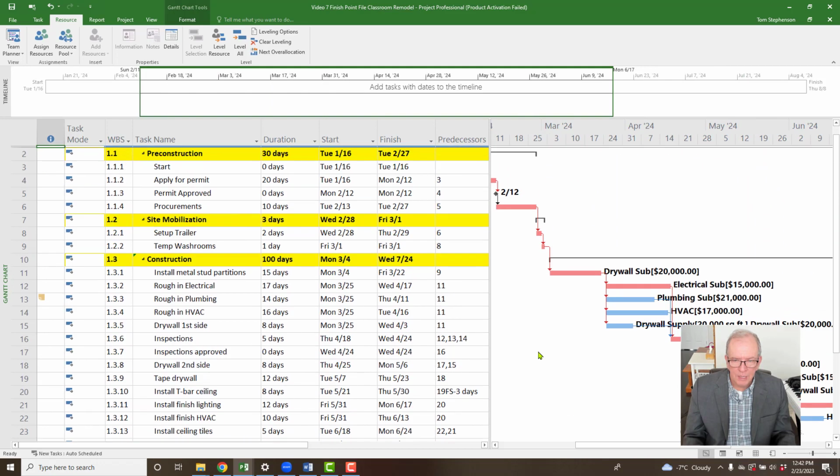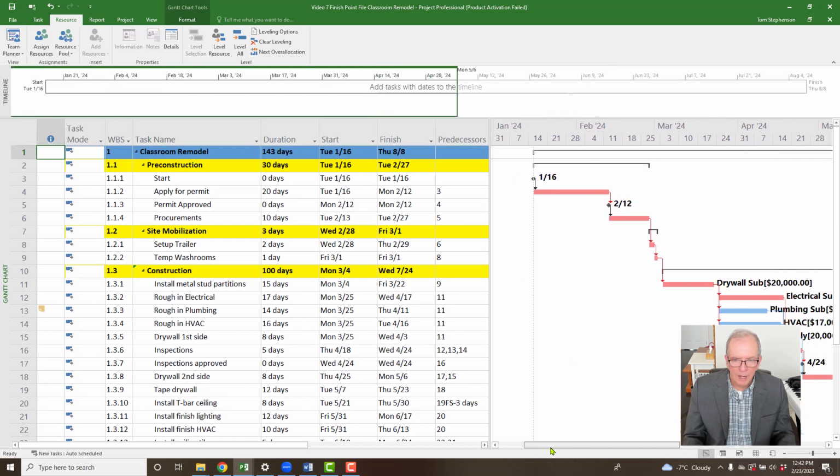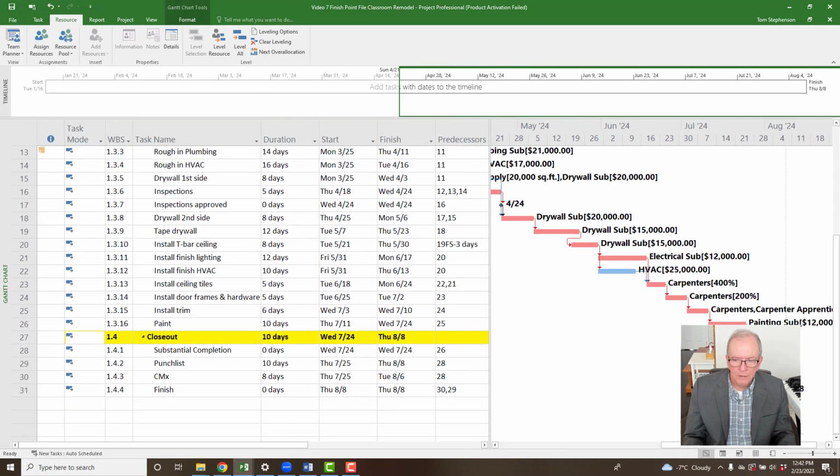I usually tell my students and professionals that I usually look at the schedule from beginning to end, and then I actually do it in reverse, from the end to the beginning. In lean construction methodology, we do something called pull planning, usually from a milestone date, and it's kind of looking at things stepping backwards. It's a different way of looking at your projects, and it's really thinking about the aspect of pulling the work towards the next trade and what are the conditions of satisfaction. So what does the painter need from basically the carpentry sub that's coming before them?